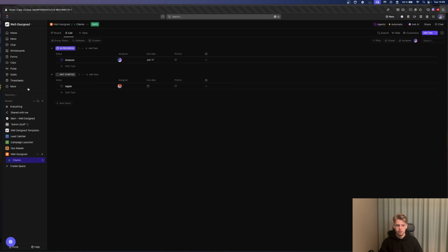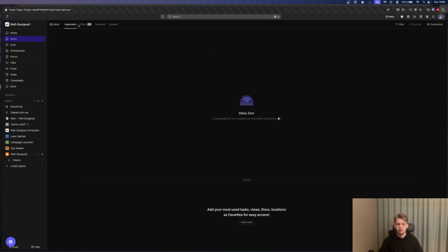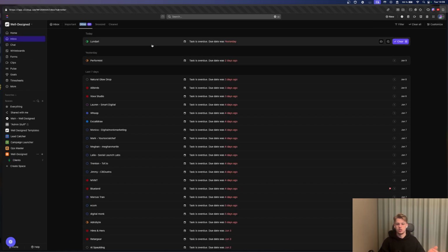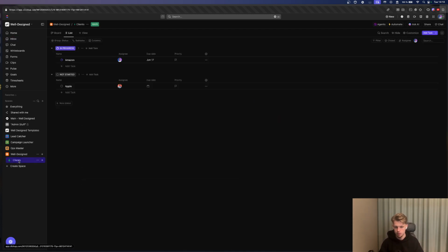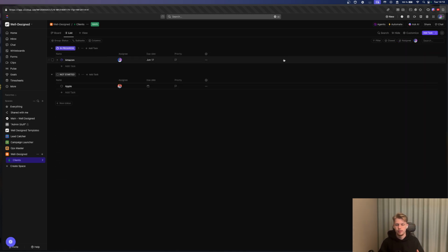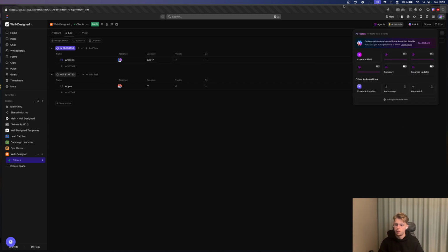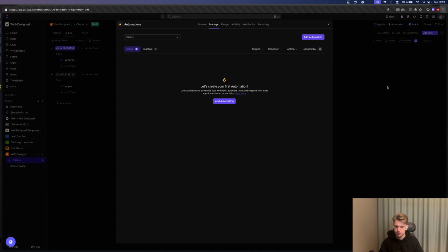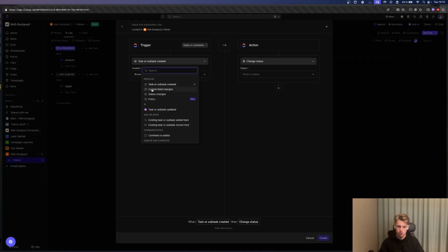It's within next week. The thing is, if you have due dates, then it will just look like this in other views. The reason I don't like this, and why it's not in an important tab, is that you don't have the automation behind the actual thing. So number one, if you have a due date, it will autosave. One thing which is important when you have a due date is to press on automate, press on manage automations, press on add automation, and press on when due date arrives.